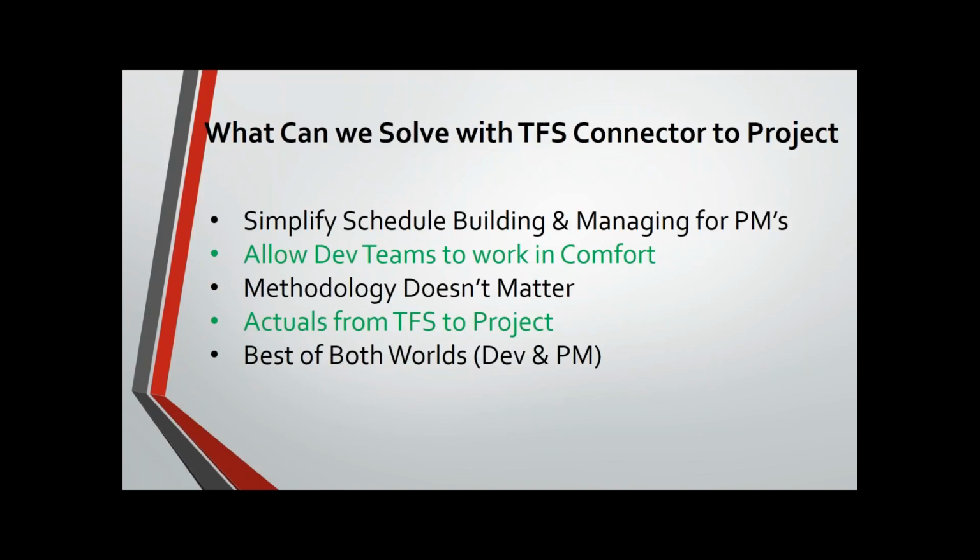And of course, if you're doing actual tracking and work in TFS, why do I have to go and put my actuals also in Project? And that's what a technical resource might be thinking. But if we can say, look, I have no problem consuming your actuals and putting them into the schedule, we eliminate a lot of that chasing of information, status updates, etc., and we can begin to use that single source of truth, which is really shared information between two environments. Again, the best of both worlds.